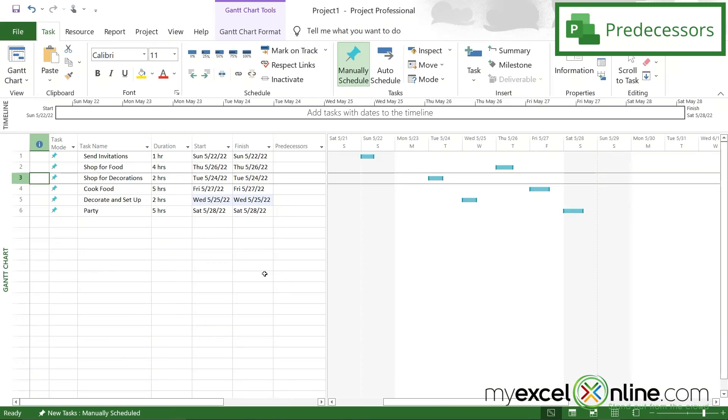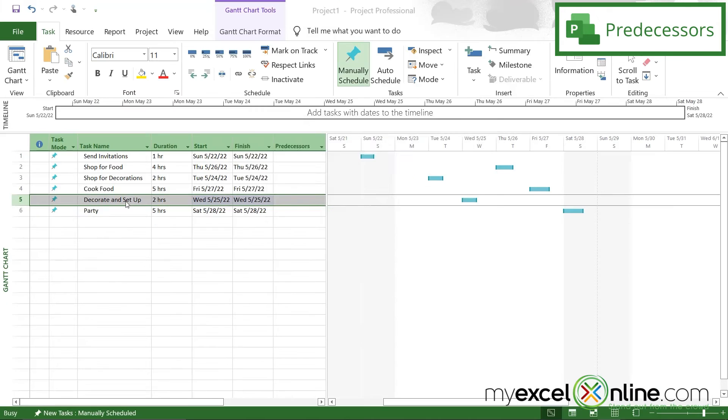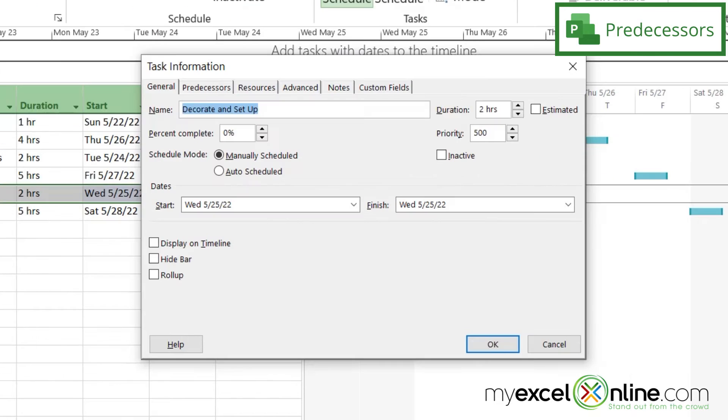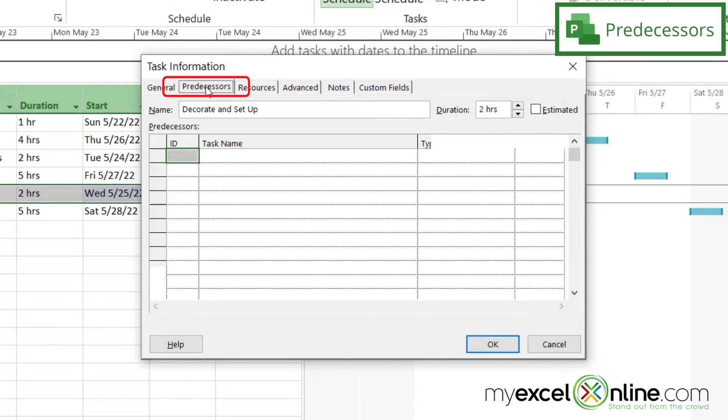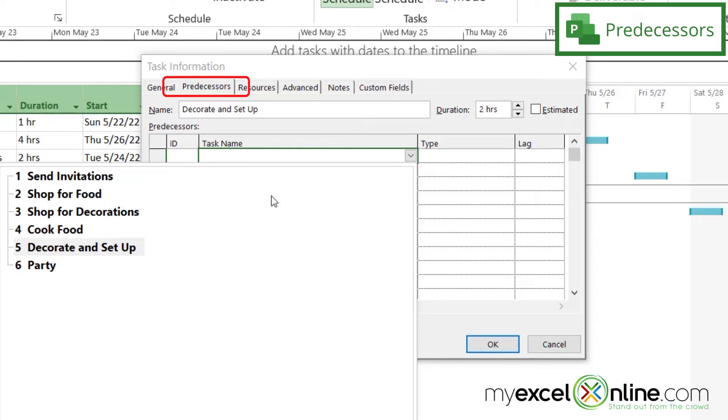So let's think about some of these tasks a little bit more. I can't really decorate until I shop for decorations. So if I double click on decorate and setup, I can click on this tab right here called predecessors. And if I click in task name and hit this drop down, I can look at some of my tasks that I've already entered. And I can set one of these tasks to have to happen before this task.